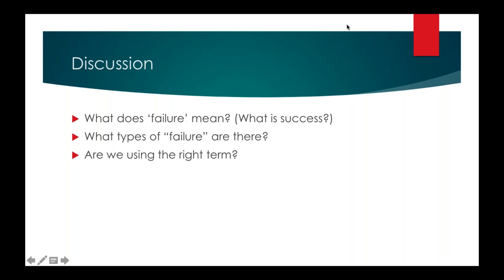This is building off what some other people have said in the discussion, but there are formats for conducting conversations about lessons learned, and I found them to be useful at granular events, like a system outage or something, where you can bring people together. There's a process for blameless postmortems of events like that. Some people call them after action reports. The intent is to learn about what happened, if there's a process failure, or it was a hardware failure or whatever it was.